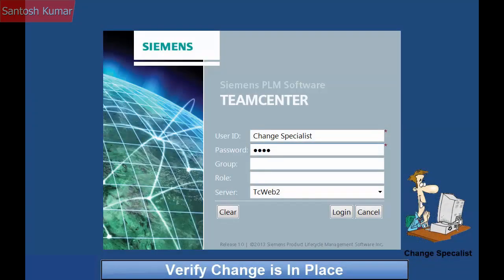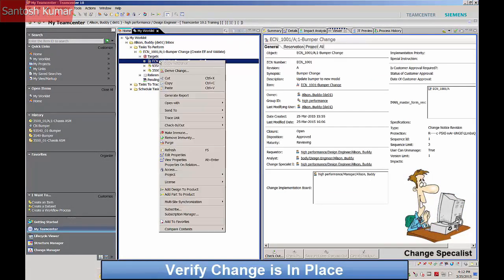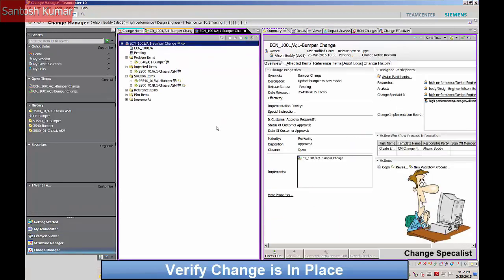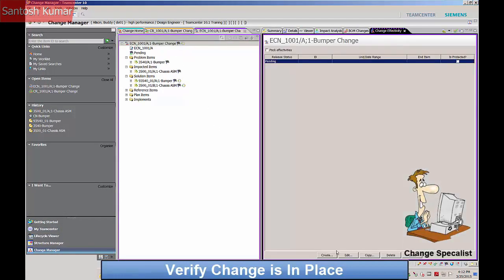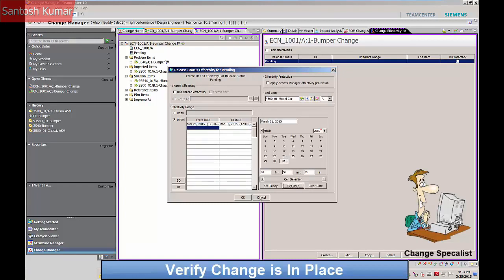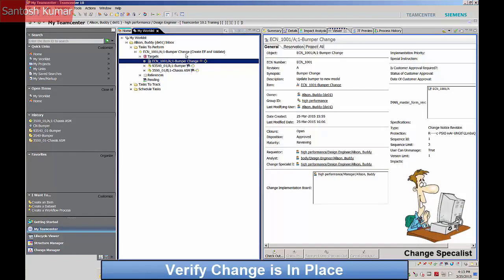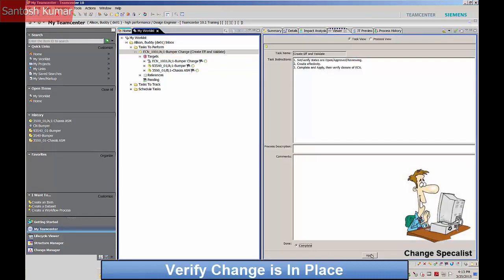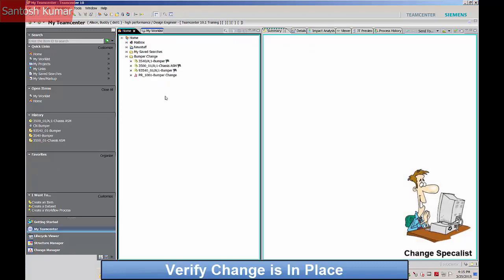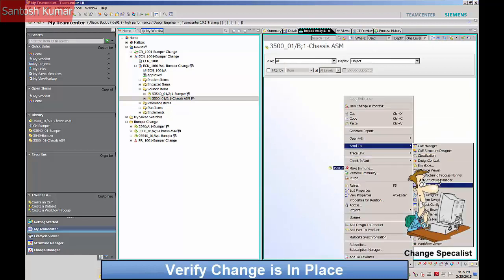It is now the task of the change specialist to input the effectivity date and verify that the change will take place on that date. The effectivity date is input through the change manager application and is completed. The where-used report locates the top level assembly of the whole car and it is sent to the structure manager for review.